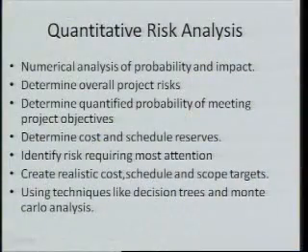Now, quantitative risk analysis is a process that generally makes use of statistics or numerical analysis, and it actually plays with this probability and impact. It determines the overall project risks. It determines the quantified probability of meeting the project objectives. It determines the cost reserves and the schedule reserves associated with the project.